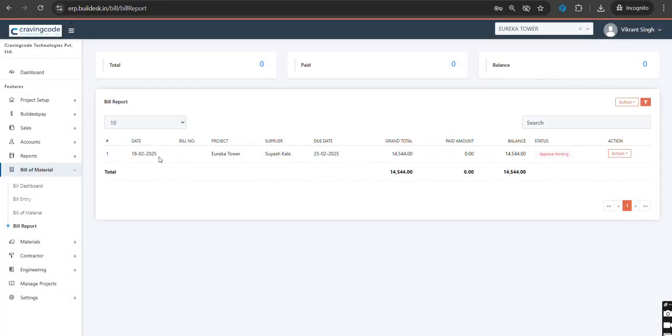So which suppliers are submitting a bill, based on the raised invoices how much value you have paid, and what is the balance value. It helps you to strategize and schedule better billing, have a better forecast and better clarity on what is the pending due upfront, and what value is supposed to be cleared on time. So this gets tracked from here.